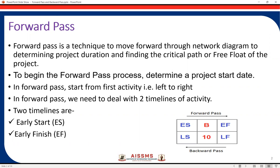When we say the critical path, it is the longest sequence of activities right from the start of the project till the end of the project. And float basically is a measure of the amount of time an activity may be delayed without delaying a succeeding activity or the whole project finish.